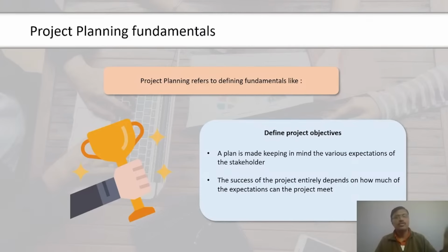The fourth step we have is add description to the Gantt chart. Now we will open the box again and in that box we will select the edit option as shown in the figure. Then we will select the tasks as we had selected the duration of the task before and click on OK. We can now see the tasks have appeared towards the left side of the Gantt chart.